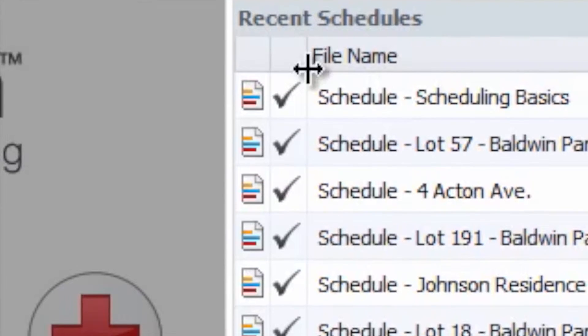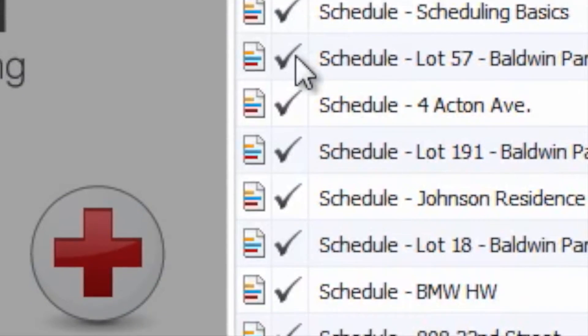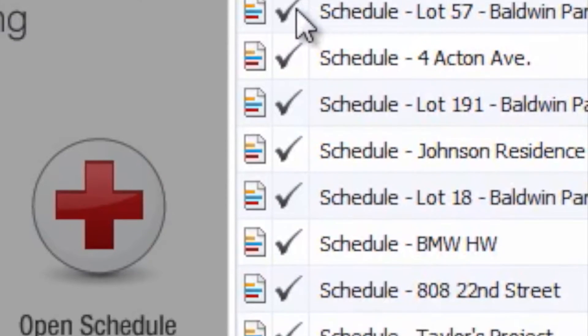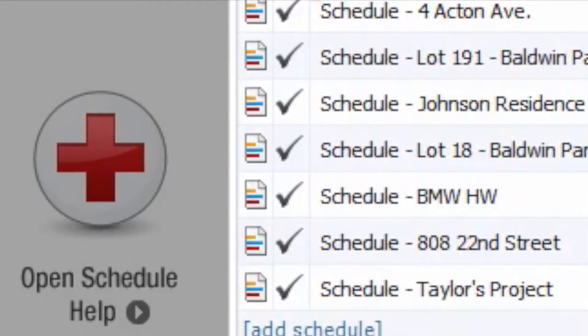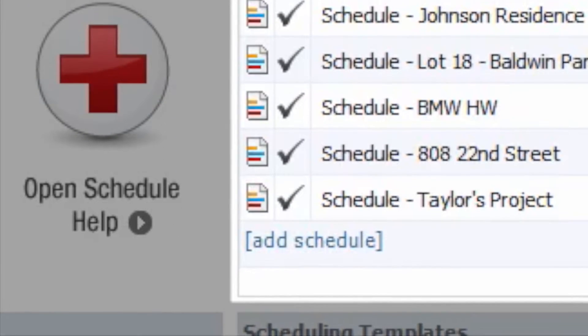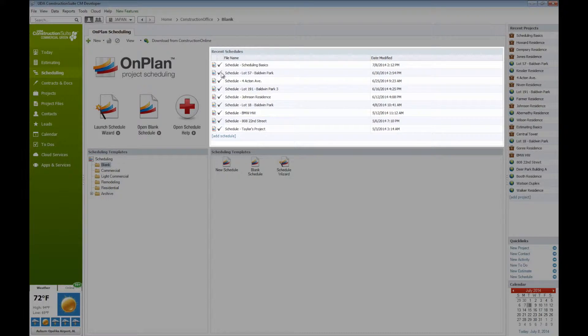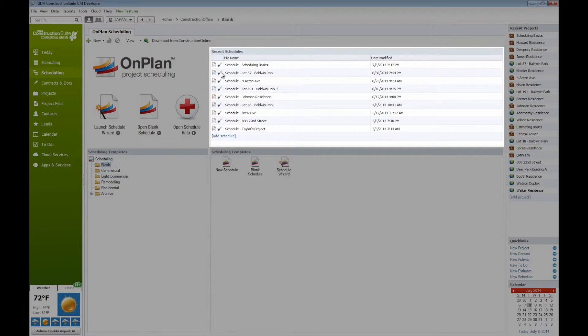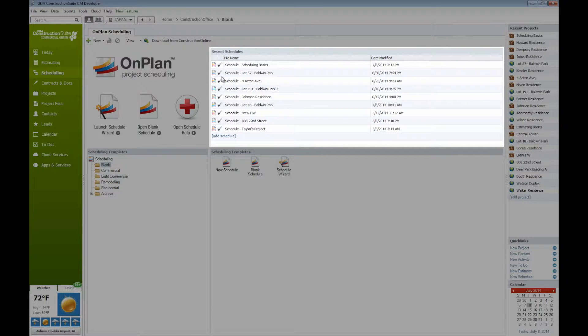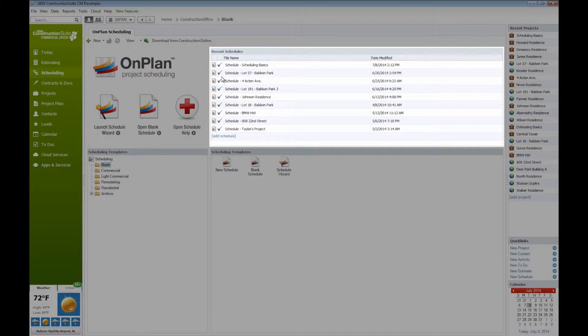Directly to the left of that name, we'll also notice we have a check mark here signifying that each one of these schedules are actually the primary schedules for this given project. That primary status is going to mean that anytime you see any sort of scheduling information, either within the scheduled tasks that are showing up in your activities window, maybe even the scheduling information underneath the project details within the specific project, all that information is actually pulling specifically from one of these primary schedules.